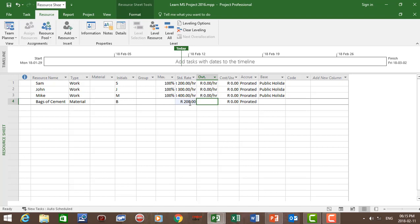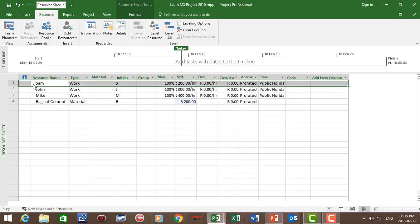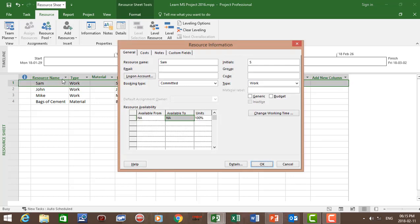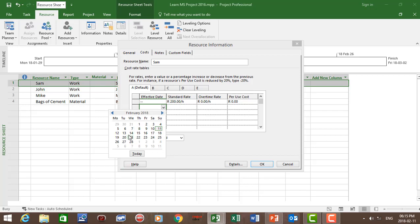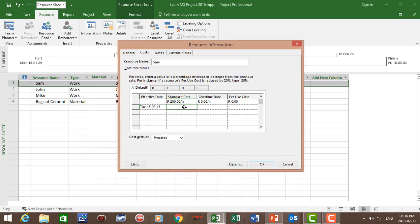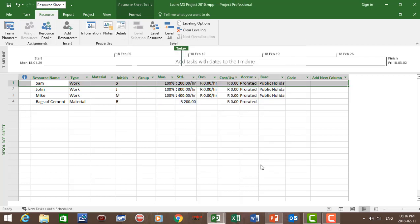Now let's say Sam is going to have a rate change due to a salary increase, which increases to 250 Rand from the 13th of February 2018. Double-click on Sam, go to Cost, and create an effective date from the 13th of February — Sam's standard rate is going to increase to 250 South African Rand. Click OK. So now we've included the rate change for Sam.